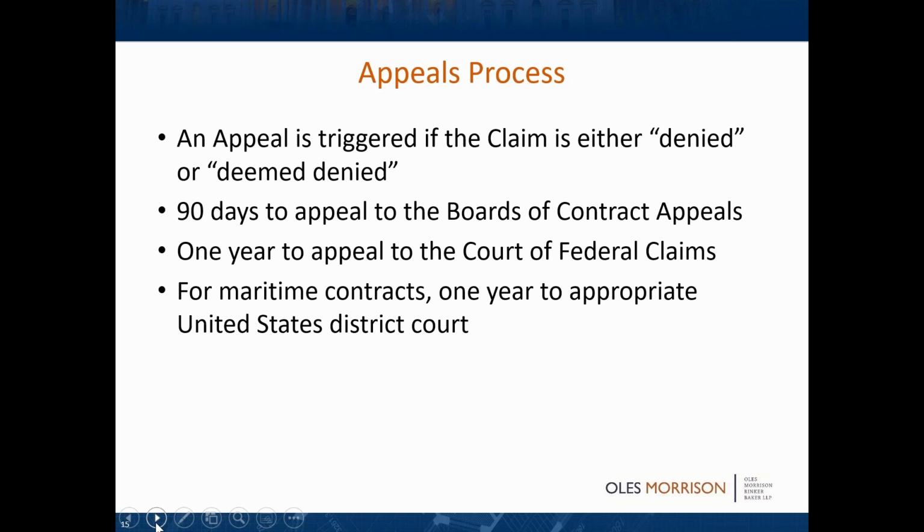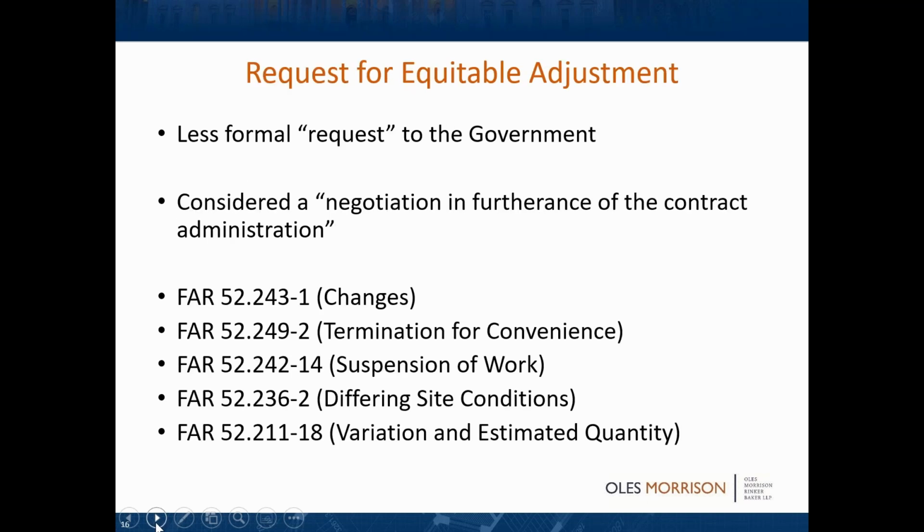And that tricks people up a lot. What's a maritime contract? Well, it's anything having to do with navigable waters other than construction of a ship. Construction of a ship is not a maritime contract.